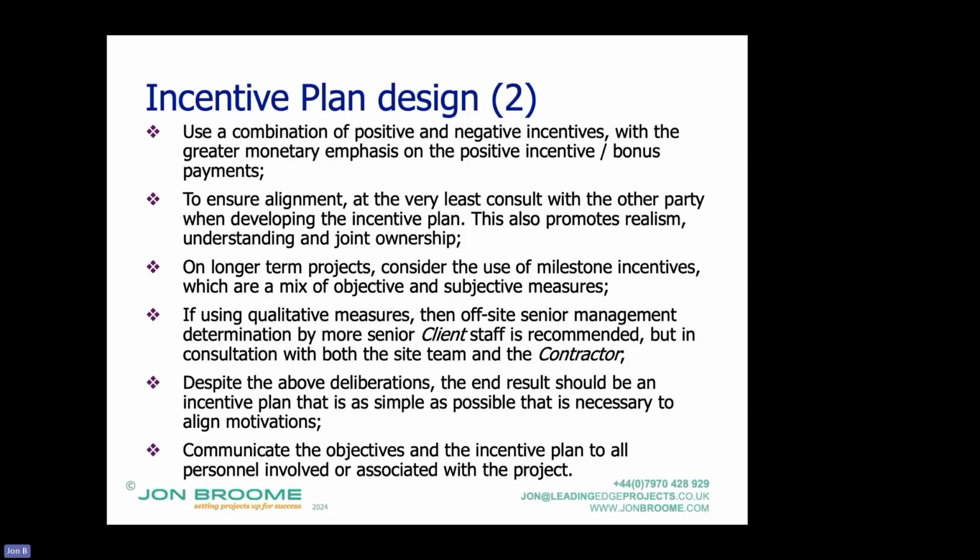And I know, I was helping a consultant look at an alliancing opportunity. And on the downside, the negative incentives, or the upside, there were about 3 hoops they had to jump through before they actually got any incentive. And they basically said there is asymmetric risk. There is too much downside risk, or far more likely that we will have downside, because if we do negative performance in one aspect, it's downside, but we have to do 3 aspects of positive performance to get the upside. So asymmetric risk. We're not taking part. We believe we'll lose money, or we're more likely to lose money.